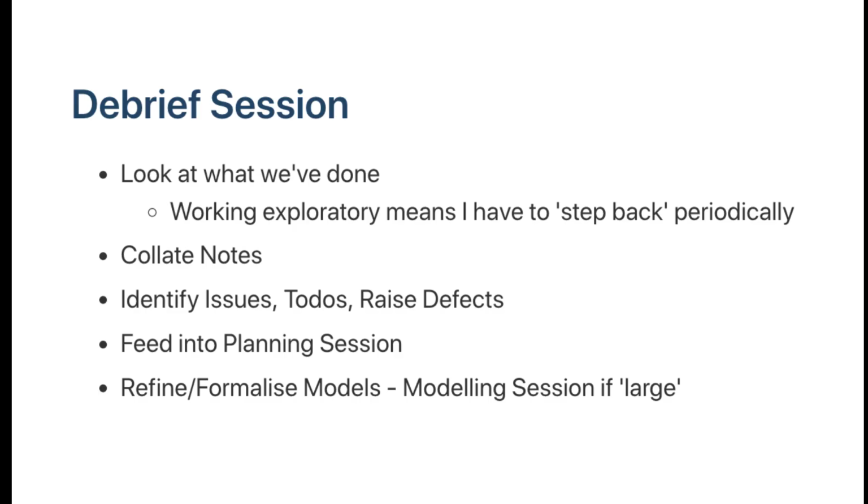I pull out all the defects, which gives me the chance then to plan an admin session for raising defects, an admin session for updating the test conditions that we might use in the future, right? All of this collation process. And I will track this collation process because it's a debrief session. I will track the time that I take on it to work out what we're doing.